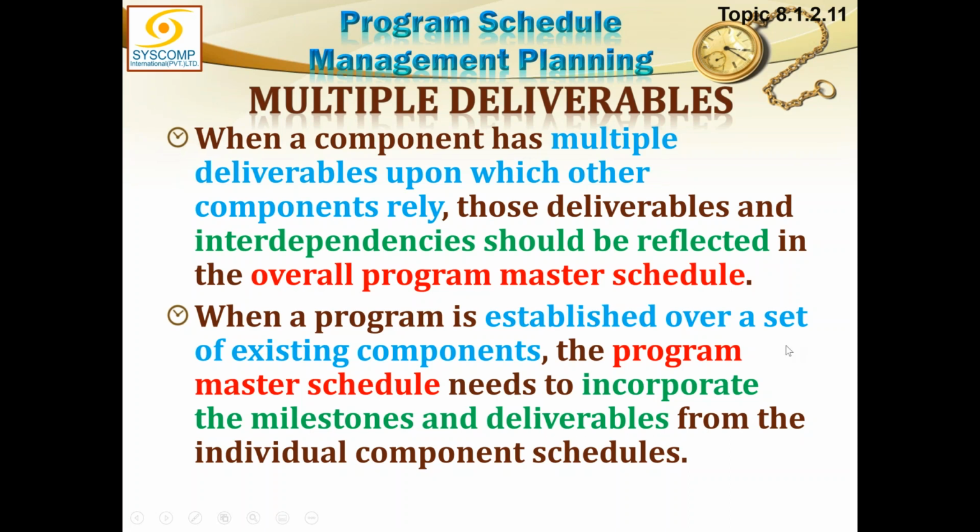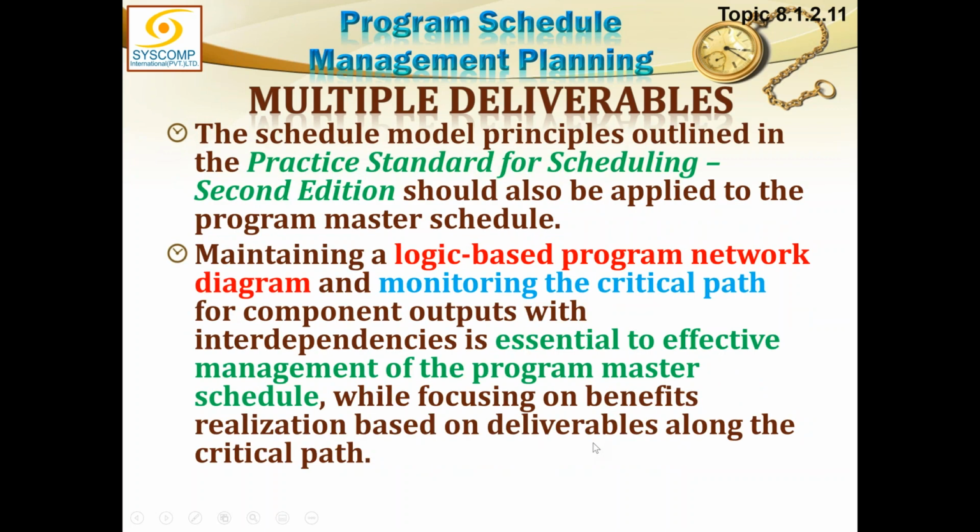When a program is established over a set of existing components, the program master schedule needs to incorporate the milestones and deliverables from individual component schedules. The schedule model principles outlined in the practice standard for scheduling should be applied to the program master schedule also.